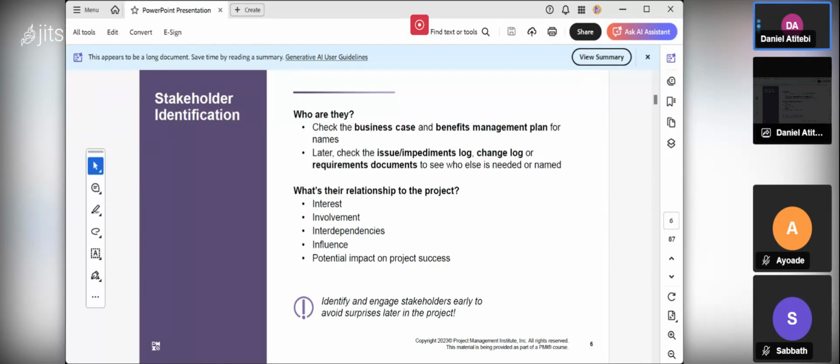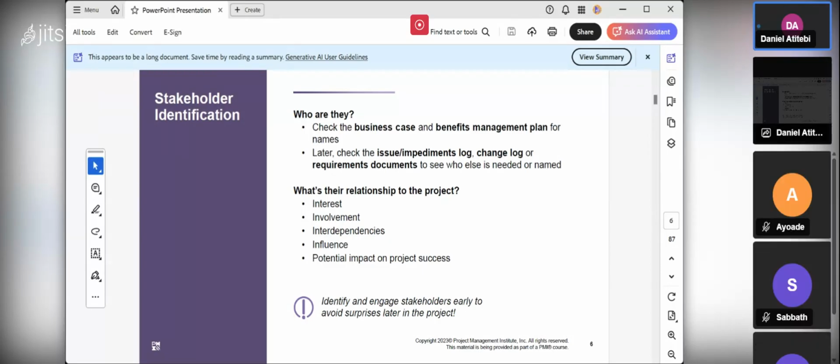So through that, you can identify who the stakeholders were in past projects, or when you are making significant changes in your project, who are the people, who is the authority, who will approve the changes. We talk about the integrated change control process. Before you make any changes in your project, you document the change request and submit it to the change board.